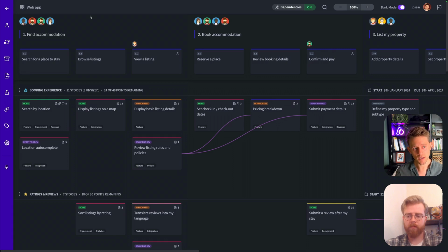The second thing is, is it written from the perspective of your users or customers? And you can see here, a nice, easy way to do it is think of a verb to begin with and lead with a verb. But we're not doing it based on internal stuff. We're doing it based on the customer, the user. And then the final thing is just making sure that you're mapping at the same level.